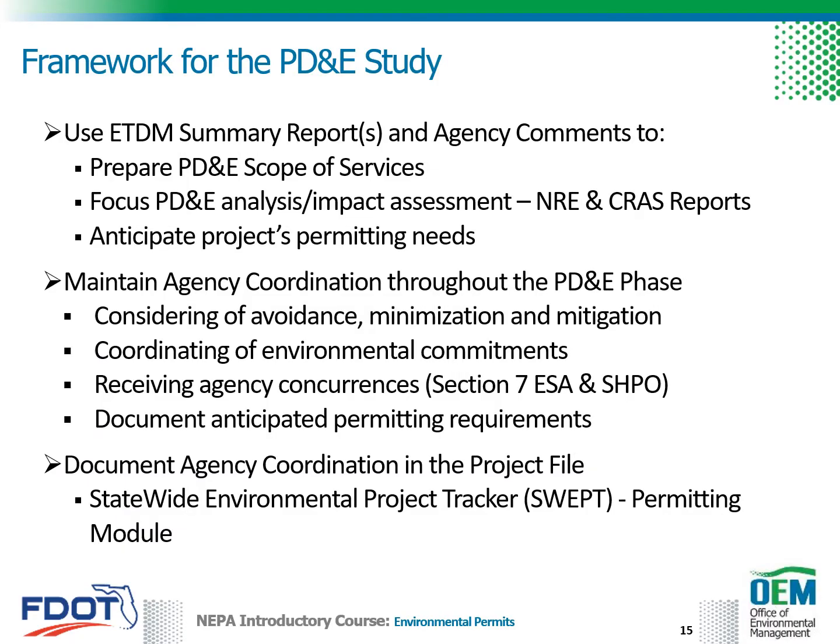The ETDM summary reports and the ETAT input from the permitting and resource agencies should be used to prepare the framework for developing the PD&E scope of services, focus PD&E analysis, and anticipate projects' permitting needs. Coordination with the agencies should be maintained throughout the PD&E study on specific project issues such as considering avoidance, minimization, and mitigation measures, coordinating environmental commitments, receiving agency concurrences, and documenting permitting requirements.